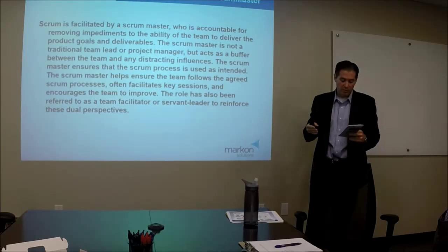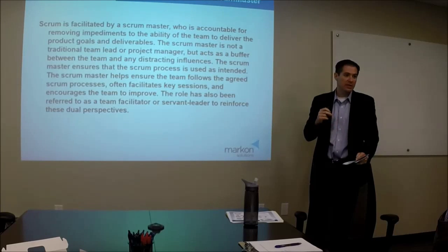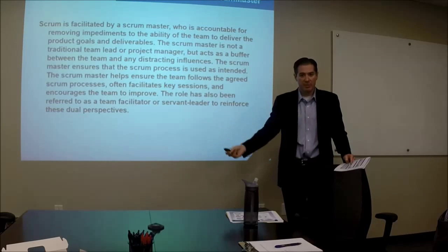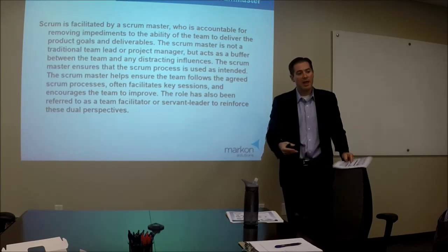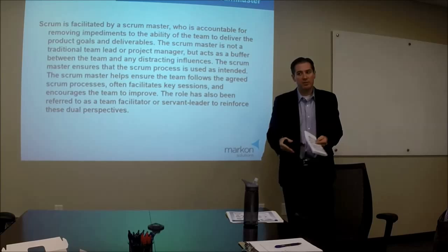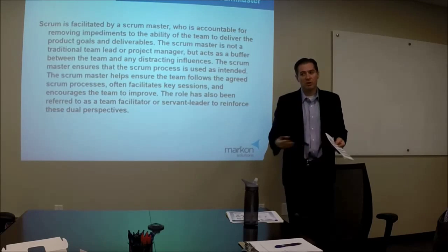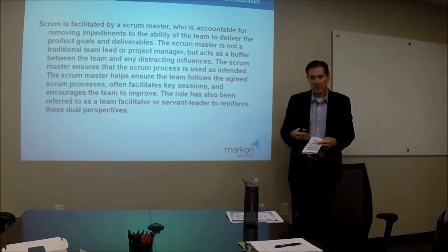And one of the key roles is to remove impediments. So it's the Scrum Master's job to work with the team on a daily, weekly, monthly basis to make sure that all impediments are removed. Impediments are, I'd love to do that work for you, I'd love to get the product going for the product owner, but I can't for some reason. So it's the Scrum Master's job to facilitate meetings and remove impediments for team members.